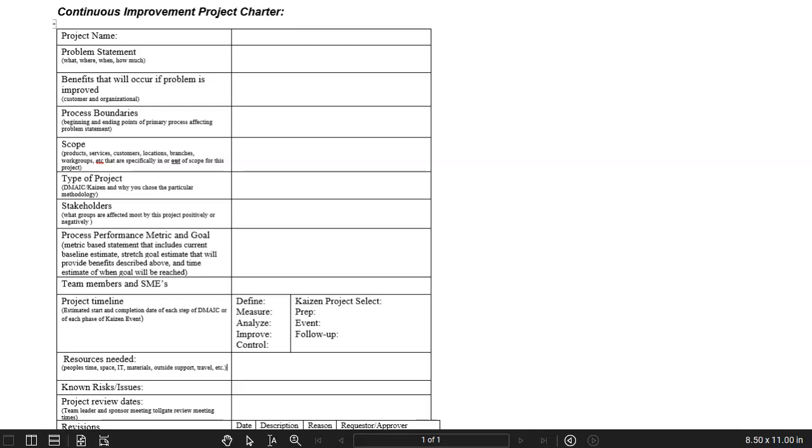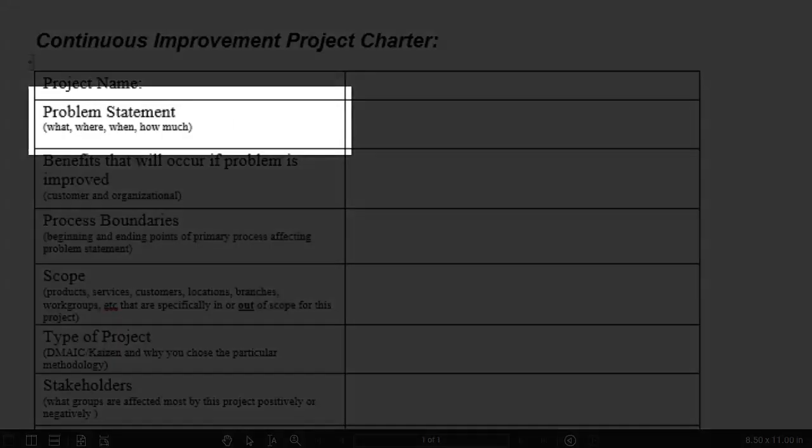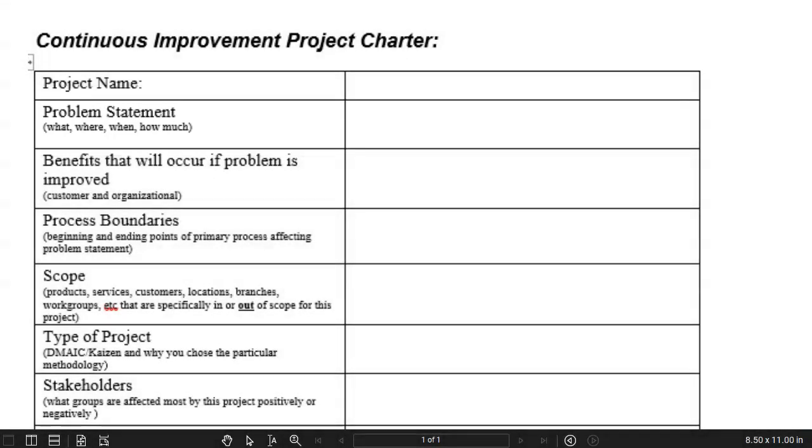All right. I've cleaned up the screen and I've got our generic project charter template displayed right now. I'm going to zoom in so that we can take a closer look at each one of these fields. Our problem statement is going to be a short and sweet statement about what the issue is. It's typically going to describe the frustration. It will typically also describe in some way the user group that is feeling that frustration. It should also describe some of the frustration that the organization feels as well. So this could be cost concerns, capacity concerns, pain points that the organization feels.